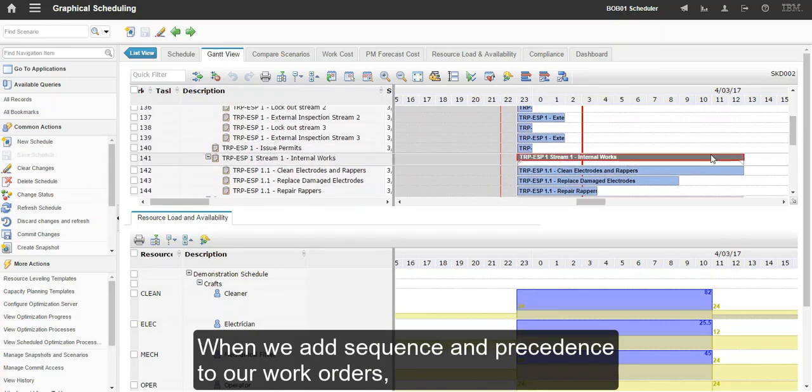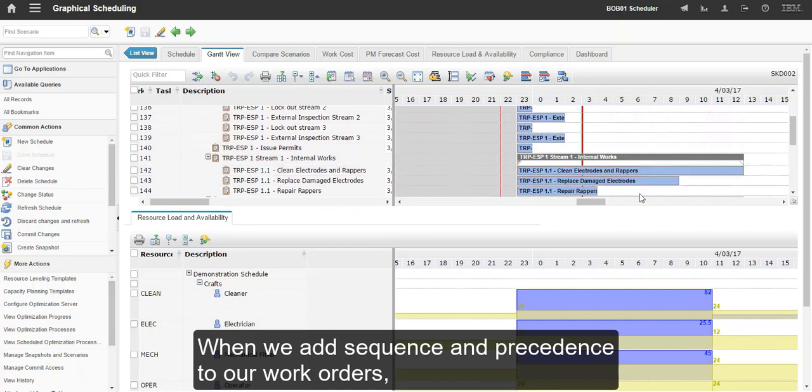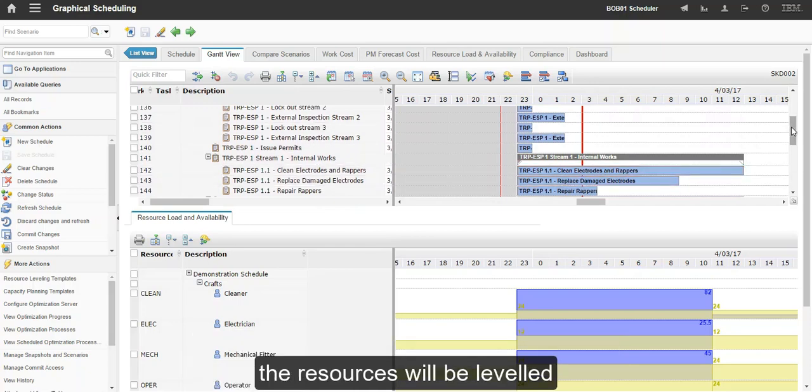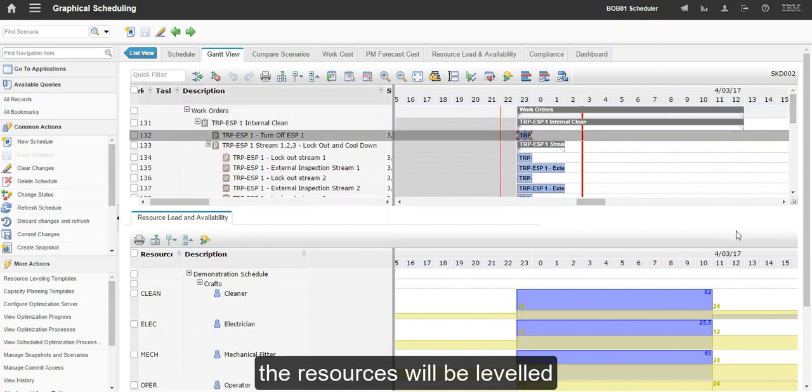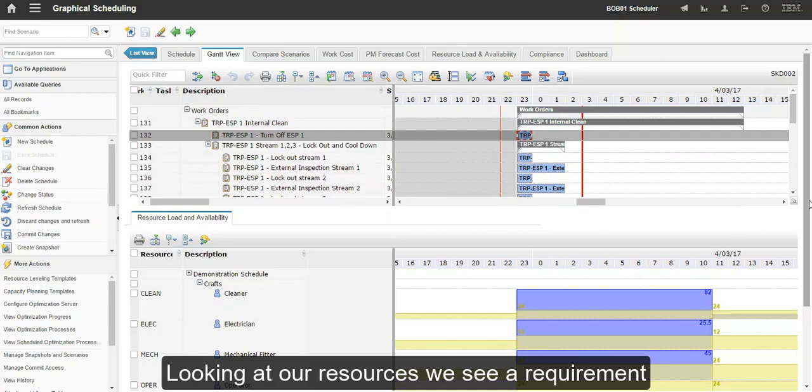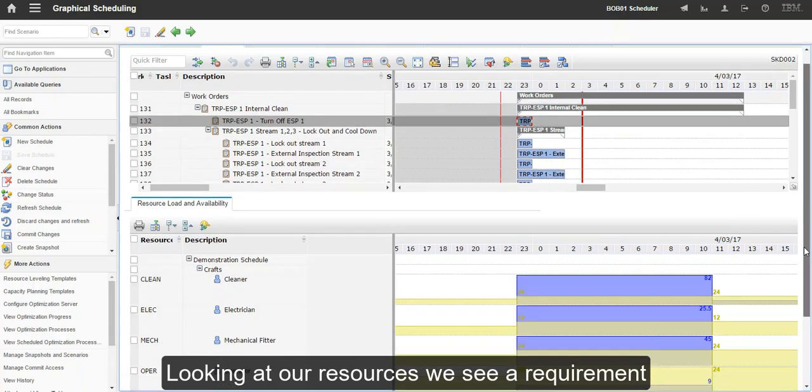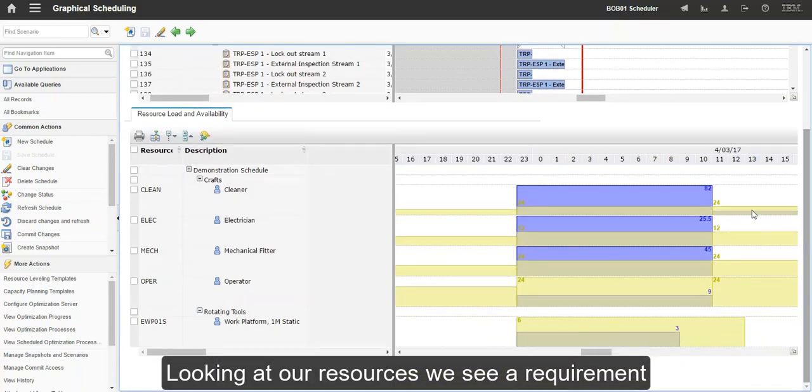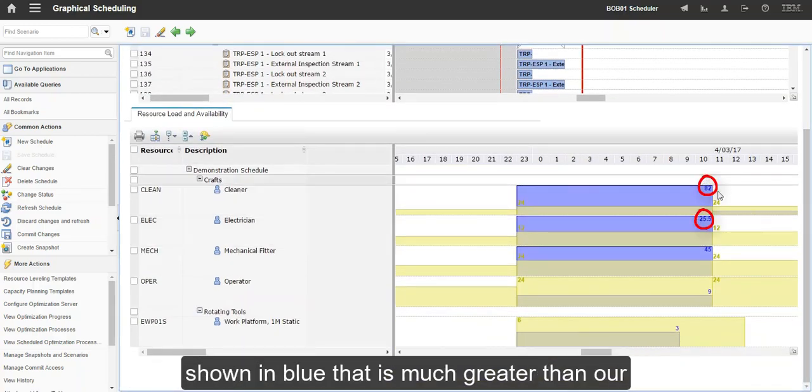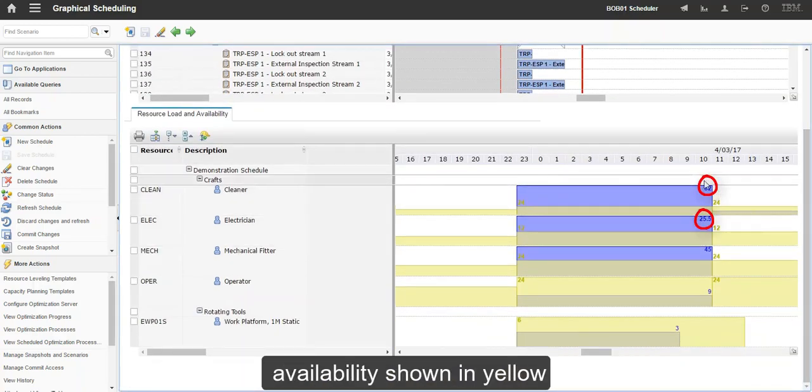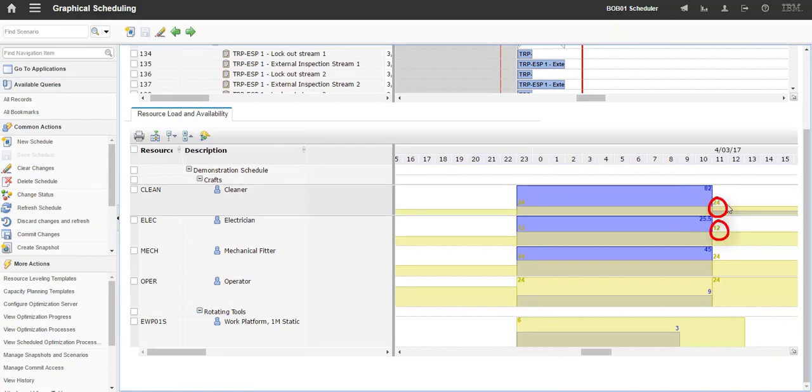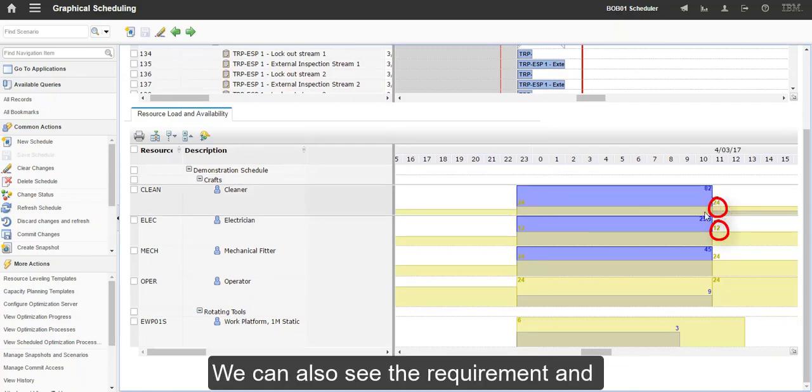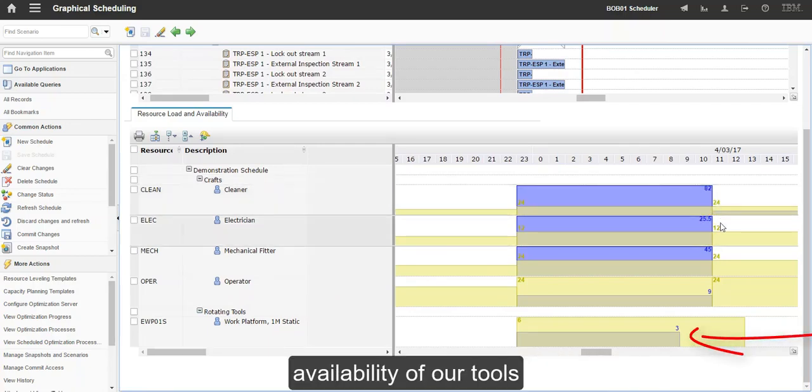When we add sequence and precedence to our work orders, the resources will be levelled. Looking at our resources, we see that we have a requirement shown in blue that is much greater than our availability shown in yellow. We can also see the requirement and availability of our tools.